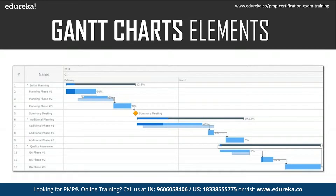Even those relationships are clearly visible in the visual representation. If you observe here, between phase 1 and phase 2, the arrow shows that before the completion of phase 1, phase 2 is starting — meaning there is some lead. The relationship is finish-to-start, but with a lead applied. These leads and lags can be put into the activities based on requirements. For phase 2 to start, certain minimum things in phase 1 need to be completed, and if situations allow with sufficient resources, cash flow, and individuals, you can add leads.